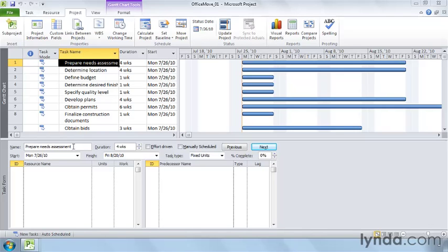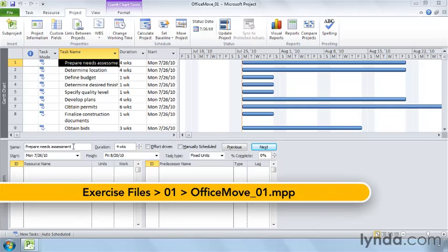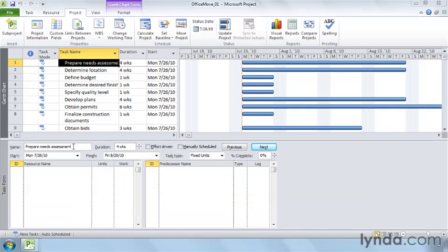The days and times that people work affect the duration of your project schedule. Sure, you could get a 7-day, 12-hour per day working calendar to try to finish a project quickly, but people won't work at that grueling pace for long, and they'll quickly become less productive. If you have teams in different parts of the world, what's considered a standard work week can differ significantly.